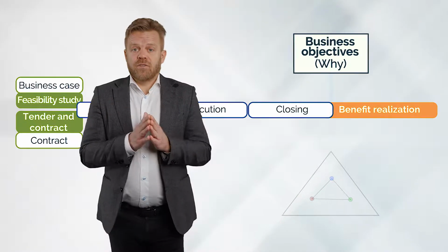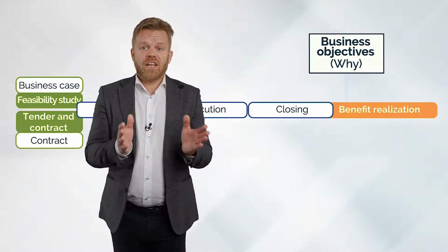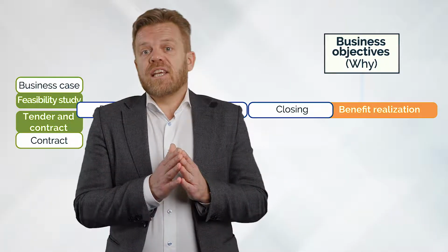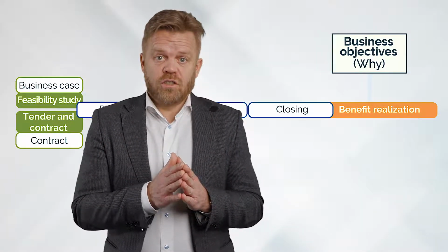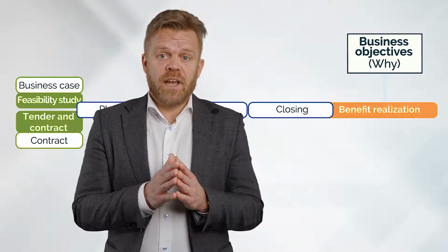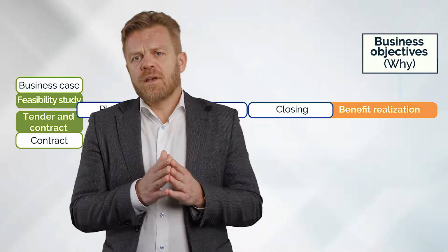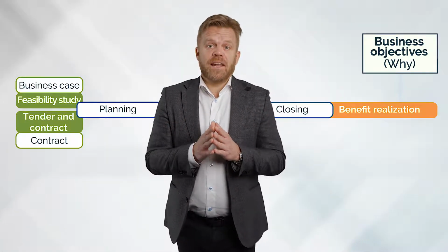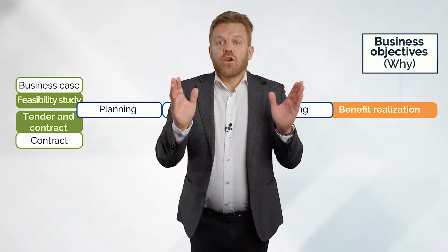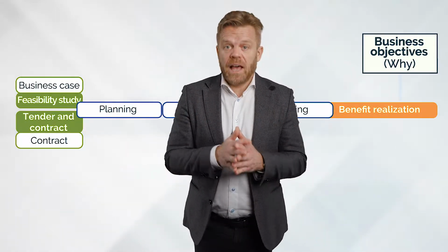And when the benefit realization phase begins, we can periodically assess the project's actual benefits and compare them with its business objectives. In addition to assessing the extent of the project's success, a comparison of objectives and planned values with actual values is important for knowledge sharing and learning. If the project objectives set in the planning phase are routinely over-optimistic, the lesson learned could be that we should strengthen the realism of future project plans.